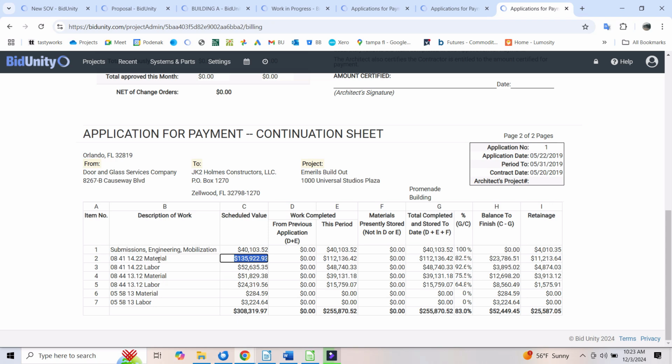And it was a custom painted, black painted material job, so we can't just fabricate half of it because we're going to lose optimization and yields. We need all the sizes to fabricate it. So they did not get everything completed on time, and it delayed us from measuring. So finally, we did get the measurements, and we proceeded immediately fabricating the material and ordering the glass.